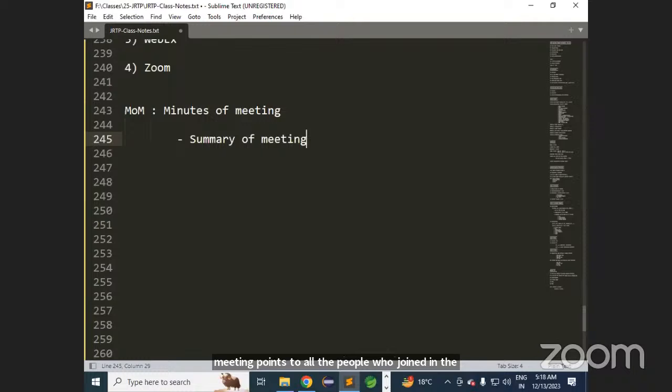So that is a track. Today I asked them how to develop login functionality. They told me two conditions for the login functionality. I have implemented them. After one month, they ask, why did you implement these two conditions? It is wrong. If I say, one month back you only told me to implement these two conditions, and I have done the same thing, the same person says it is wrong. What is the proof? That's why minutes of meeting will be the proof.